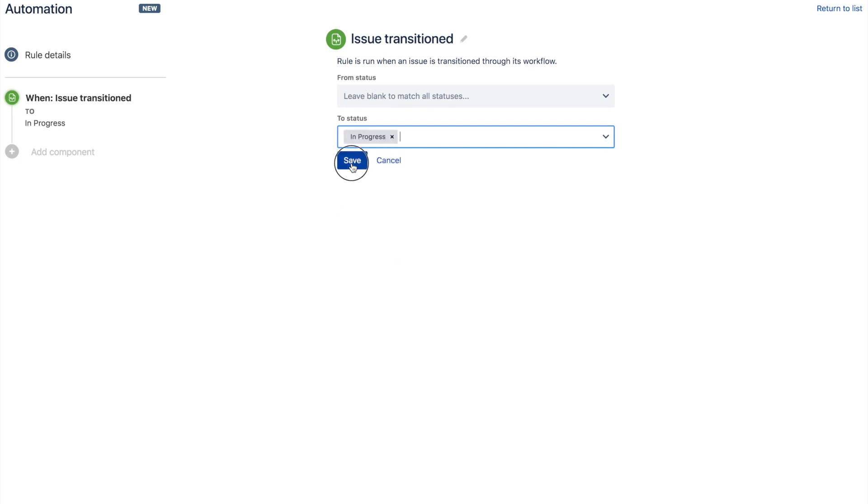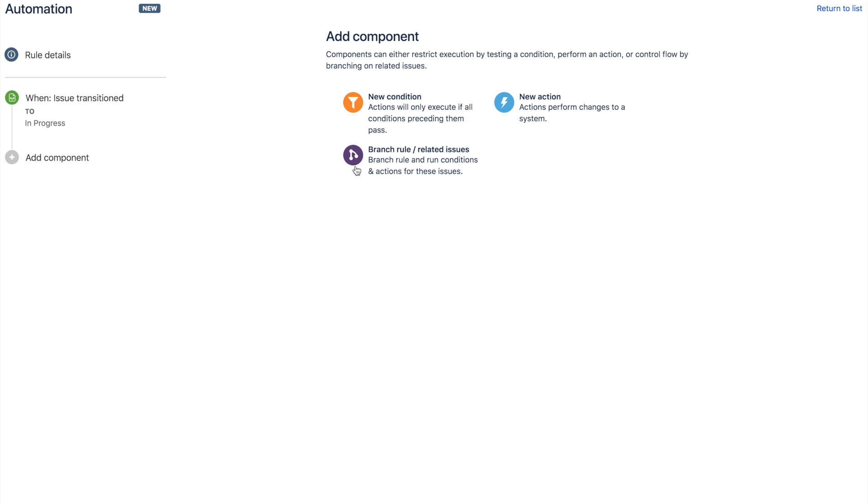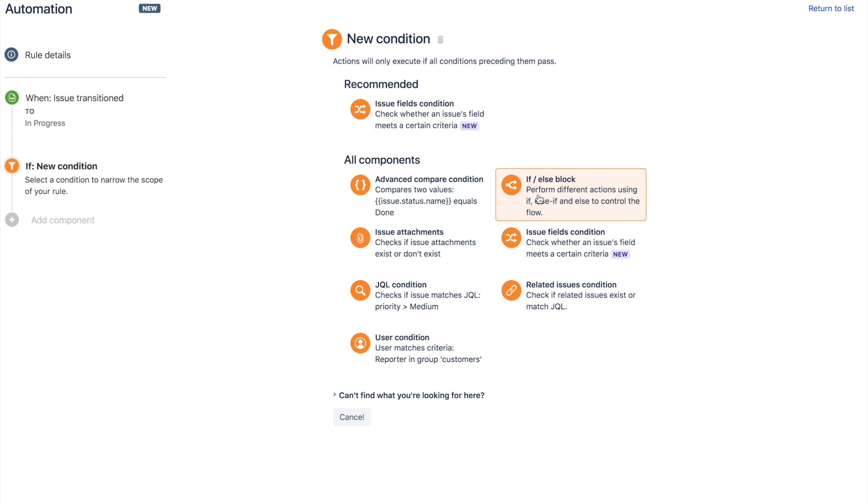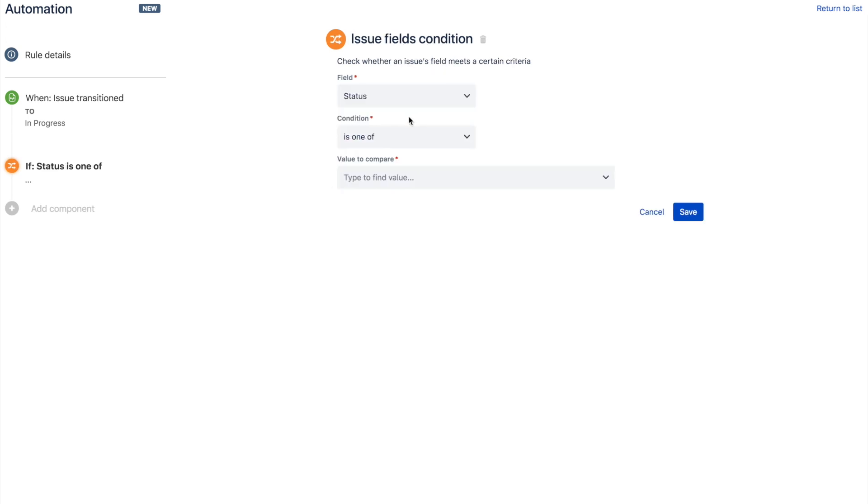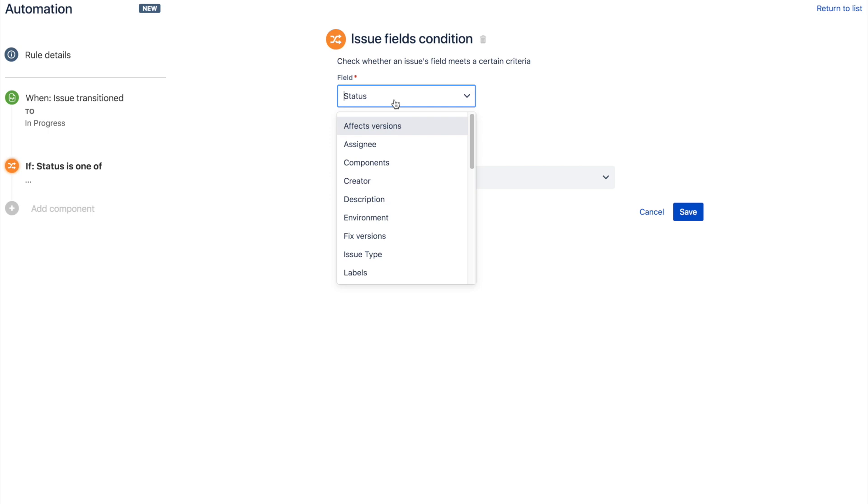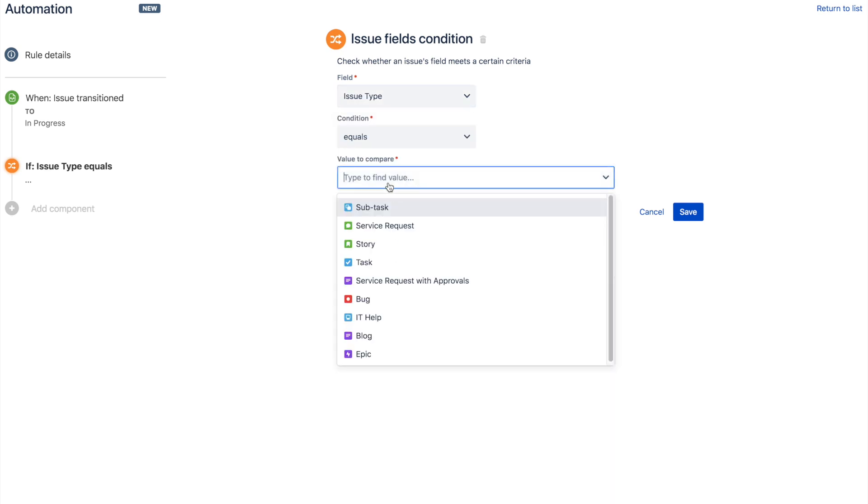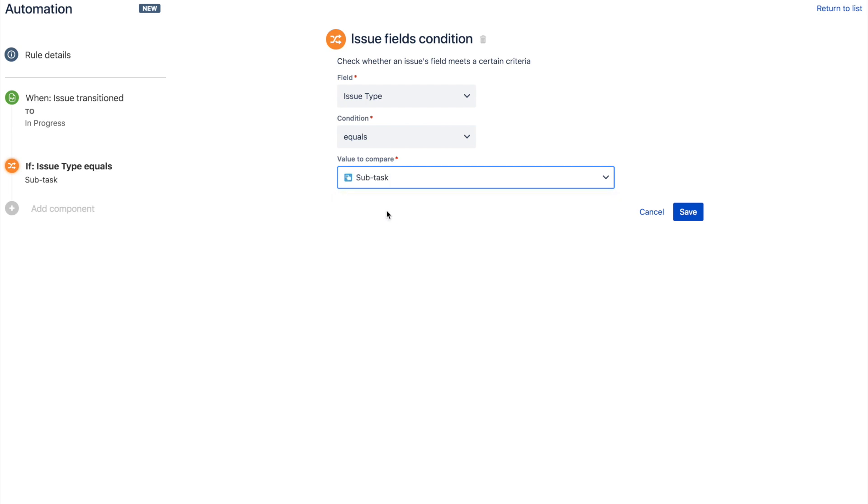And next, what we want to do is refine this rule and add a little bit of power. So we choose a condition. Lots of conditions to choose from, they all do different things. But the simplest and perhaps the most powerful one is the issue fields condition. So in here, we can just choose any field that we want to track. And in this case, it's going to be the issue type. So we'll choose that and we'll say anytime the issue type is equal to subtask. So really, the first two building blocks here are saying whenever a subtask transitions to in progress.